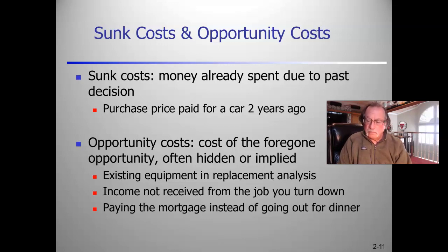And so we decided to go forward with the project, spent more on the rock crushing facility, spent more on the upgrading. So overall, it was a poor investment because we spent way more than the $700 million. But the decision to go forward was always made looking forward, not considering the sunk costs.